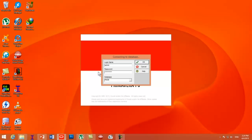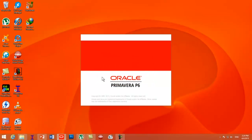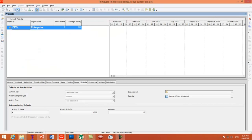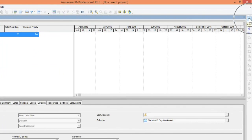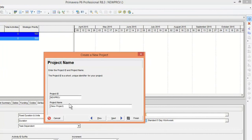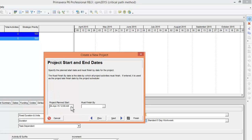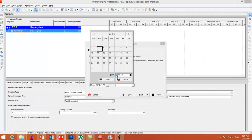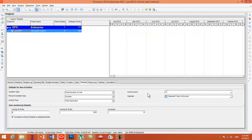Let's open Primavera P6. Press the Add button to create a new project. Let's name the project as 'CPM Critical Path Method.' Press Next, then set the project start date as 4th May 2015, 8 AM, and press Finish.